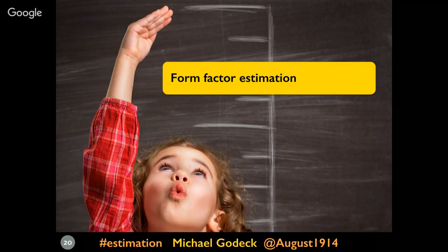And then once you start thinking time, you start risking tipping over into solutioning, because as soon as you start thinking about time, you're encouraged to think about the implementation, and that can be counterproductive because you risk early anchoring on some optimal solution. You haven't really considered it fully, because you bundle assumptions about risk and complexity before you've really had a chance to explore them. And because you spend time thinking through implementation before you've determined priority. So if you stick to the goal of decomposing business objectives into stories that can go into work, estimating in greater detail than that really can become counterproductive. There's a really strong tendency for t-shirt sizes to devolve into proxies for time estimates.